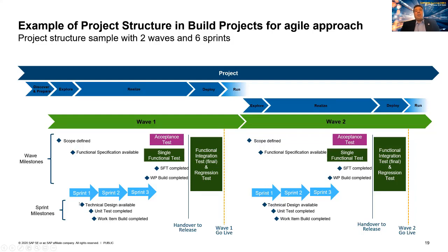So these are the milestones that we are using also in the project plan, and which we are relating our KPIs in the dashboards to, so that we immediately see if we are overdue in terms of delivering the unit tests or the work items completed, and so on.